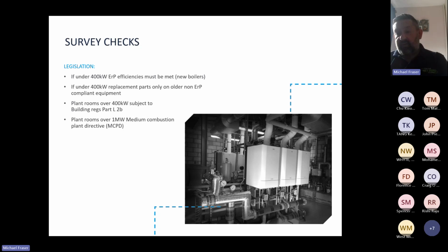Now, it is actually down to the plant operator to do the application, but it could be too late when it gets to that stage. So it may be something you want to look at before the project gets too far down the line, and it could become an issue. It was the same when I used to do flues. Every flue had to be approved by the local environmental officer. Very rarely was it, and sometimes it came to installation stage and it became an issue.